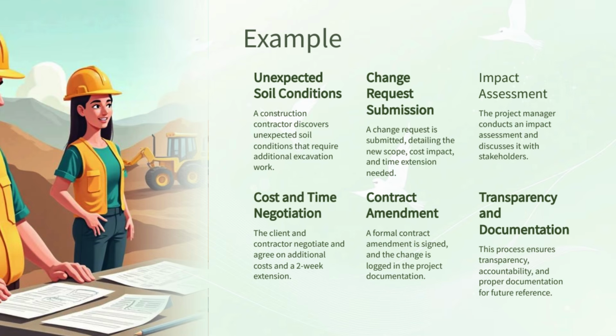So the project manager receives the change request and conducts a detailed impact assessment. This involves analyzing how the proposed change will affect the project's budget, schedule, resources, and risk. The project manager then discusses the findings with the key stakeholders, including the client, finance team, and legal advisors, to make sure all perspectives are considered before making a decision.